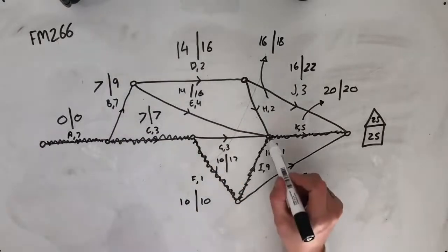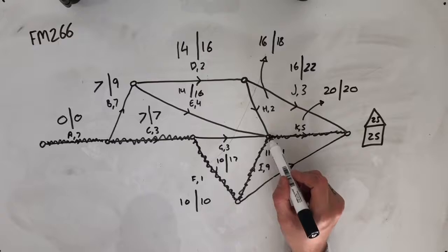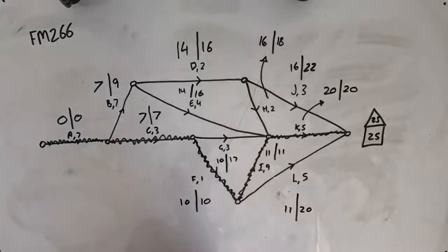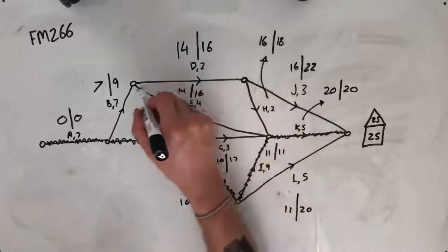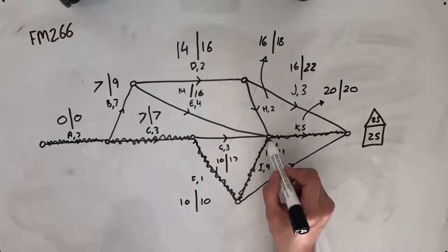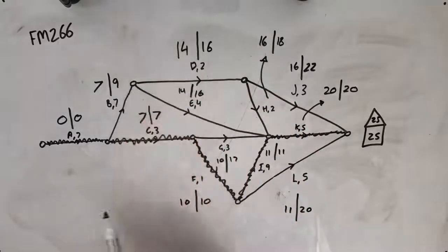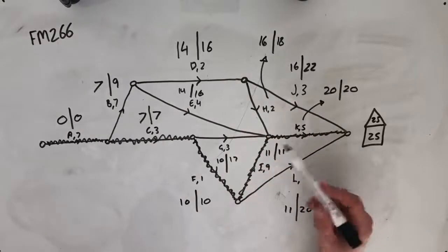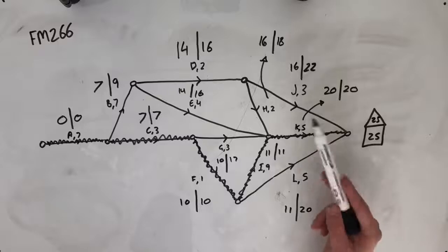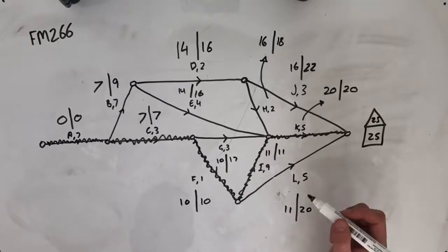So our potential other two critical paths that would be joined in would be up along the H through D and B, and from E through B along there, because they have a float time of 2, whereas the other potential pathways have float times of 6 and upwards.